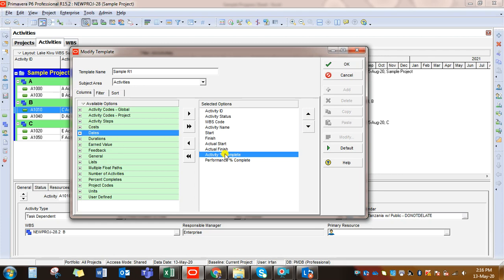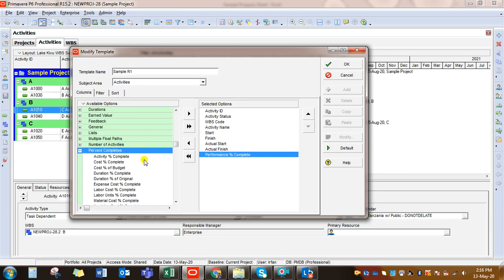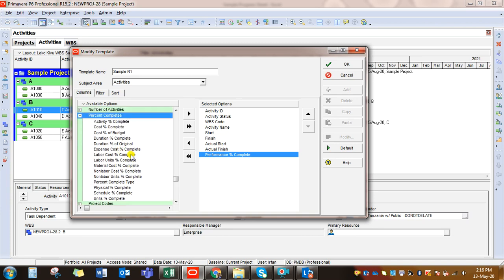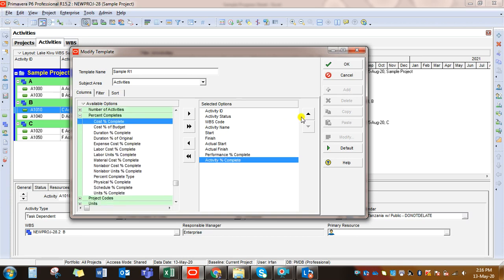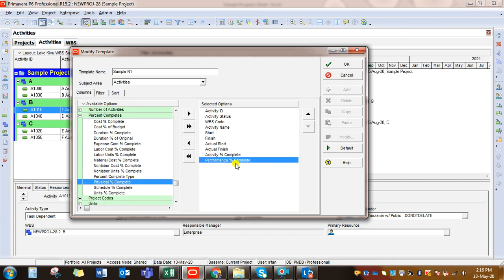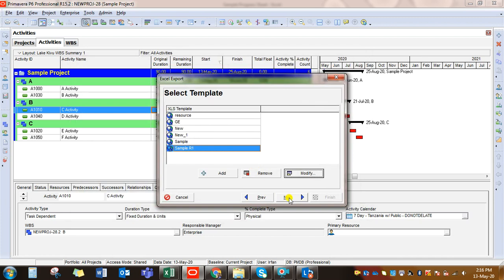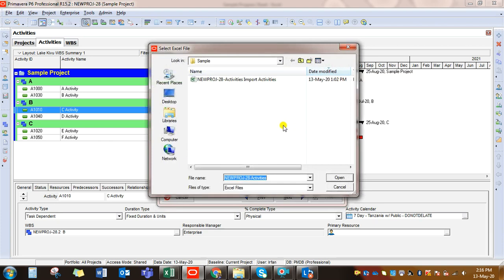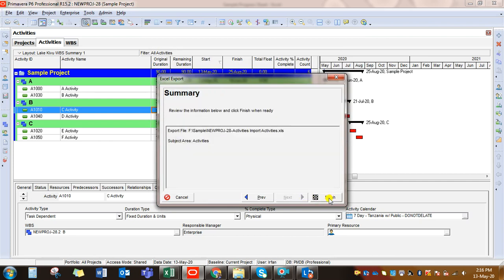We need Actual Start date and Actual Finish date, found under the Dates section. Then the most important field: Activity Percent Complete, found under Percent Completes. We have also taken Performance Percent Complete just for a lesson I will explain later. Click OK, click Next, select the folder where you want to save the file, name it, and click Next then Finish.